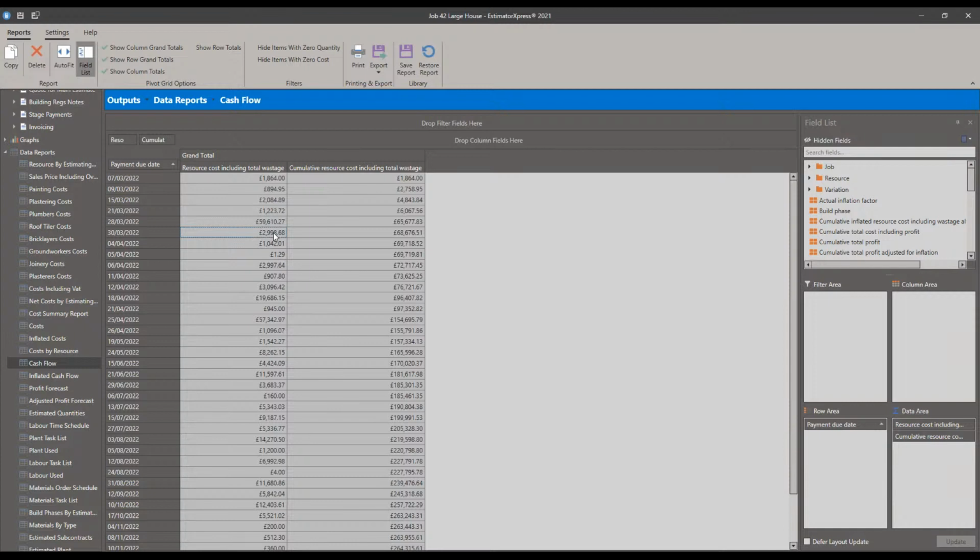So you can be grouping some of these prices together and you can see your cumulative cost by the job. So by, say, the 24th of the 5th, we can see that the cumulative cost of the job up to that point is 165,596.20 pence. And that's just basing this upon the program that we've started.